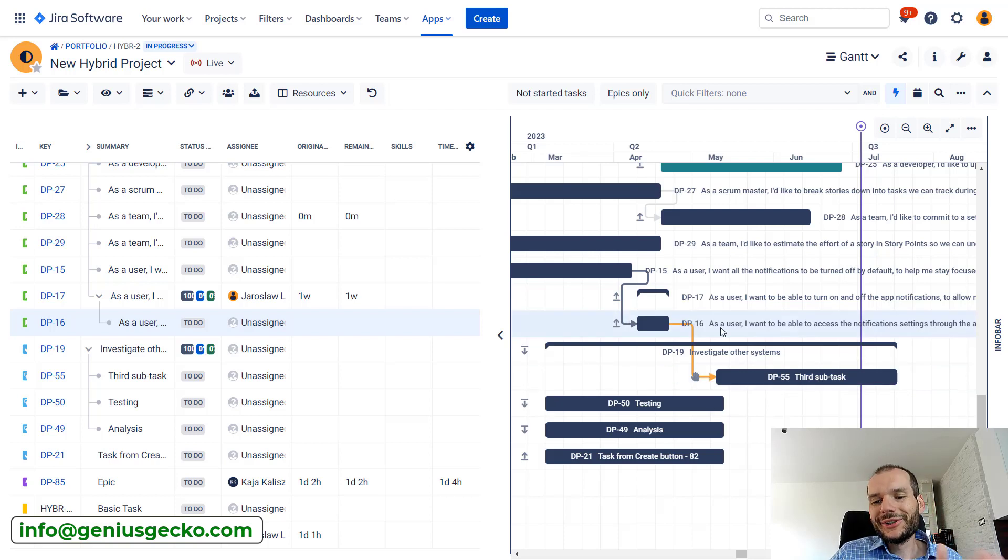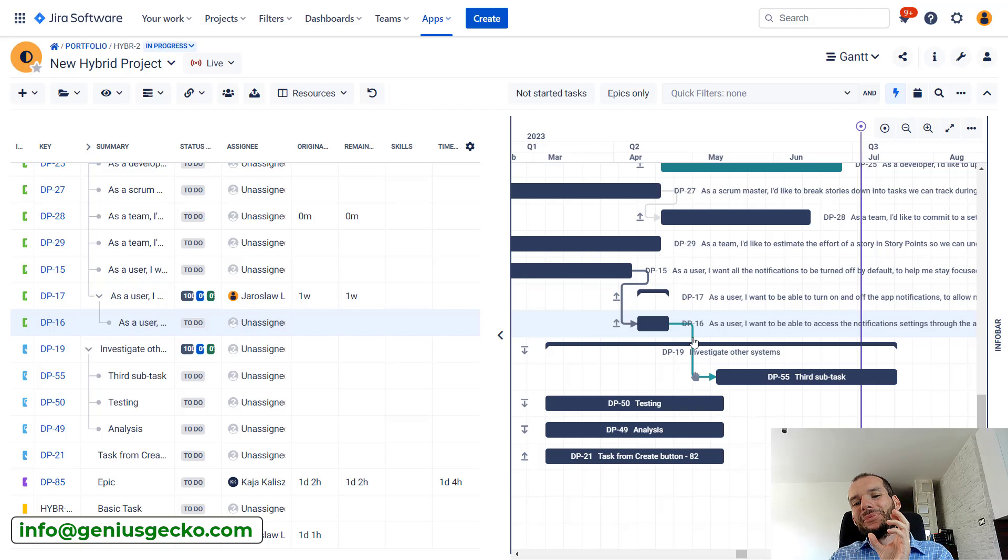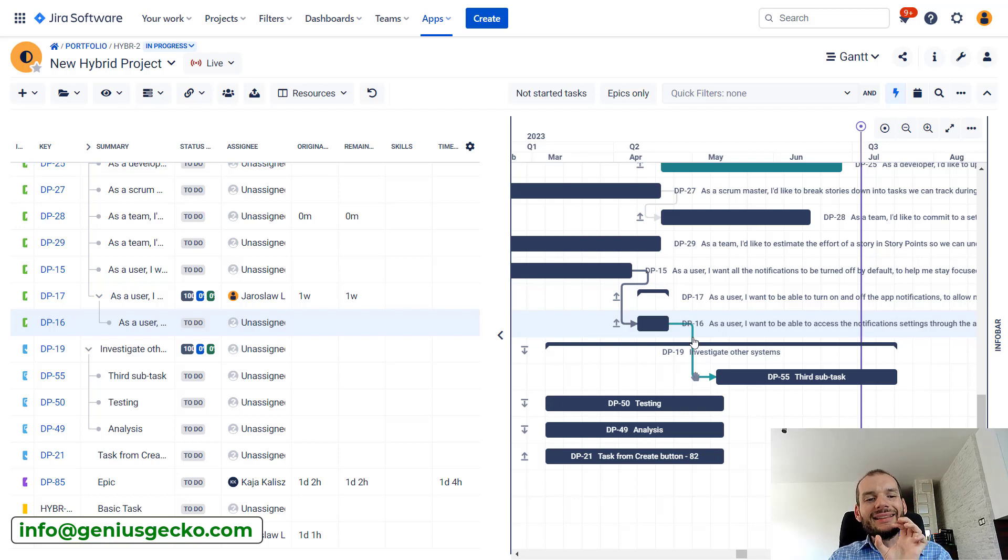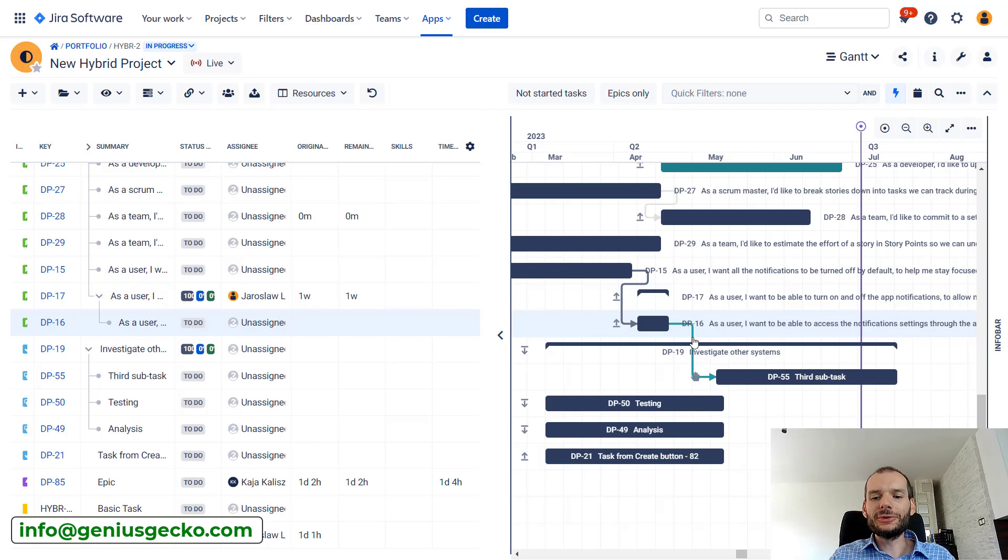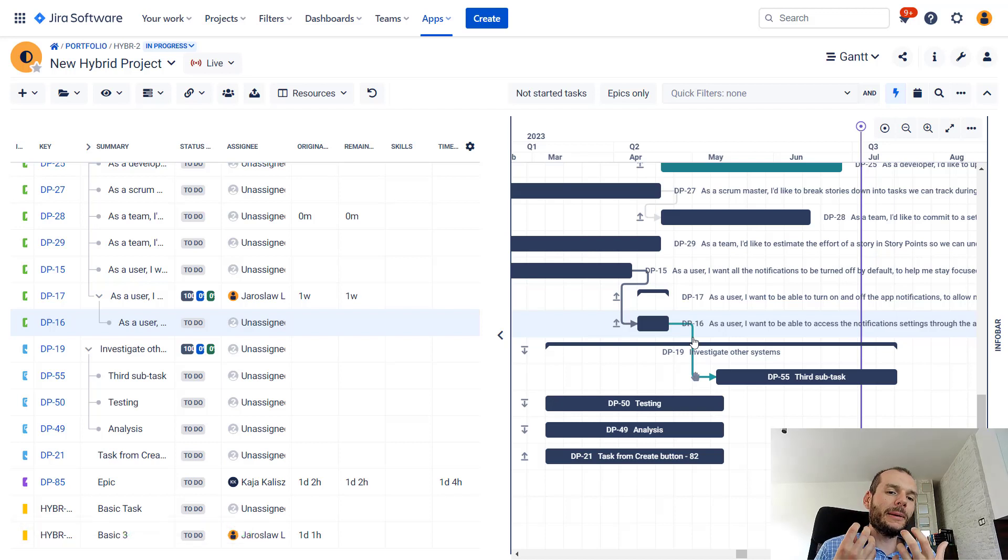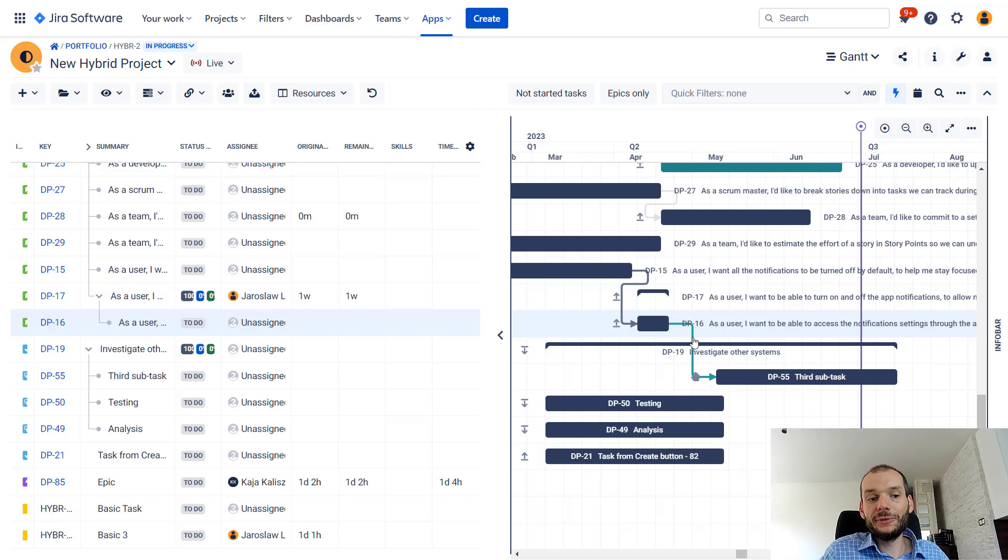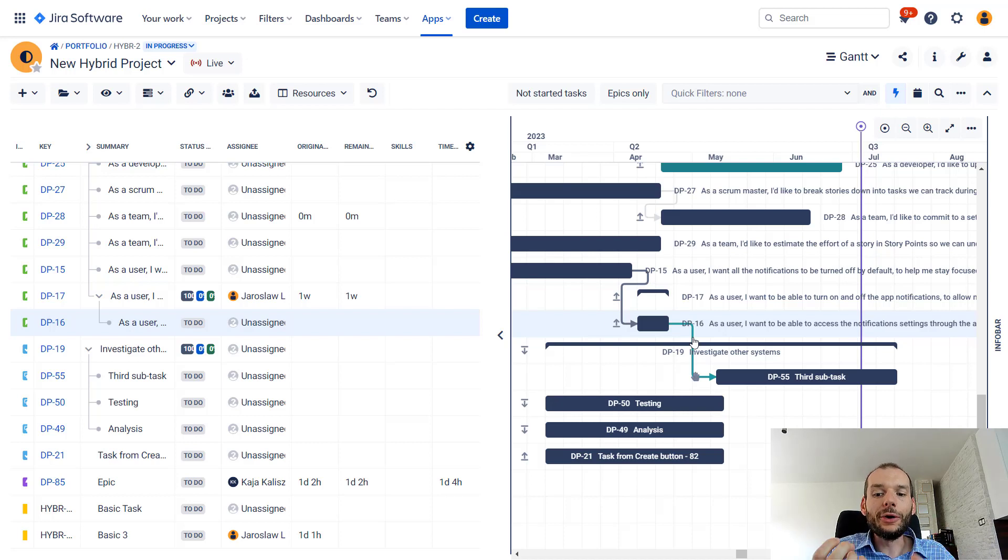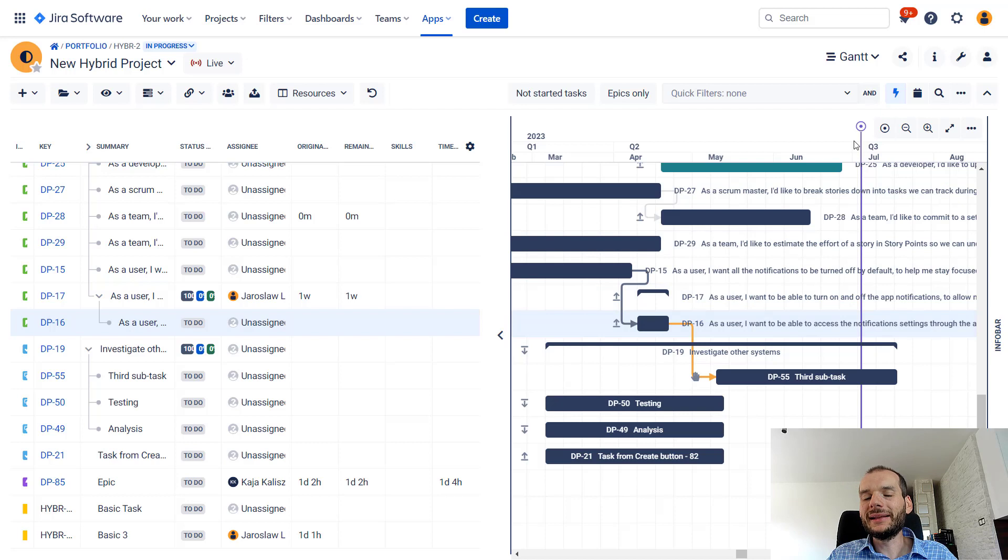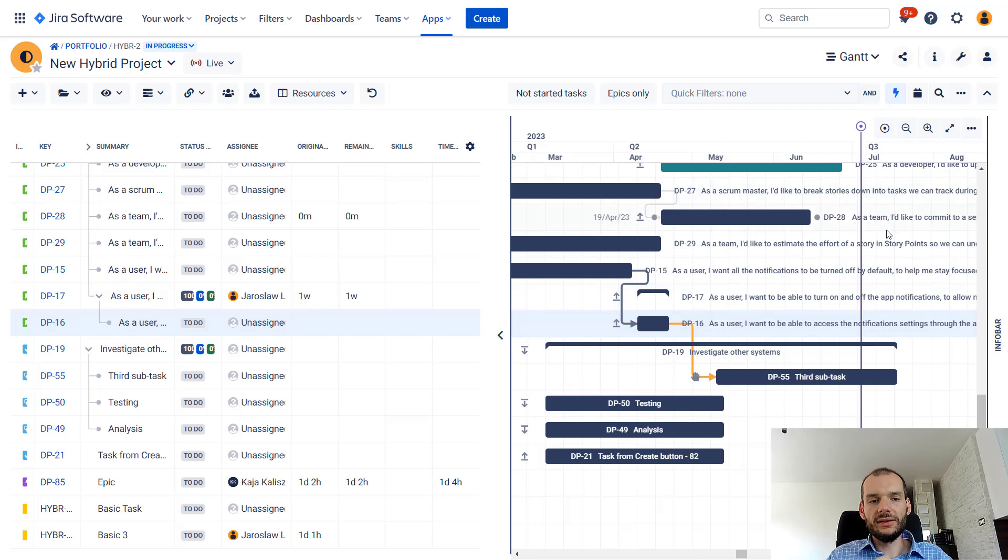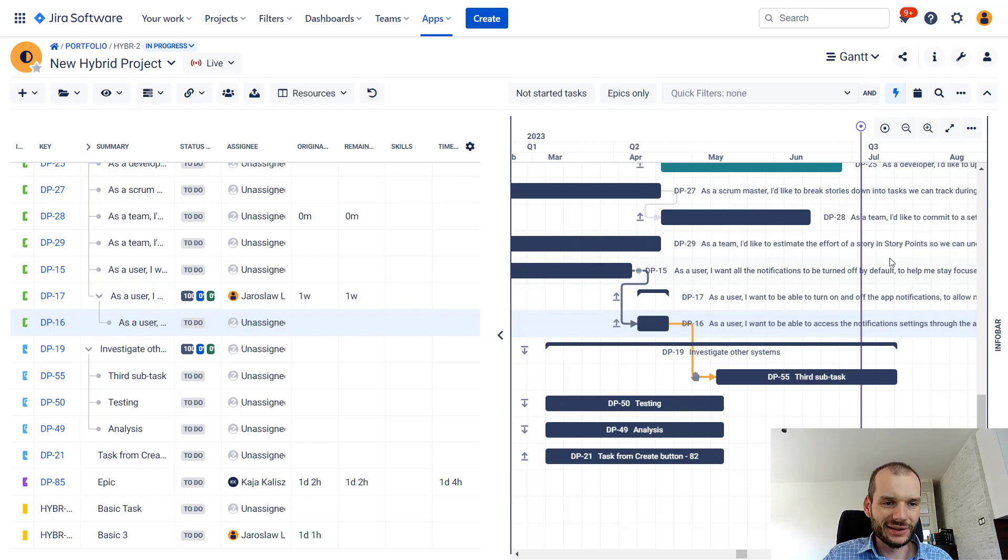Probably our plan could be optimized in the meaning that this task could be started earlier, and all the tasks potentially dependent on this also could be moved on the timeline. Maybe the whole project thanks to that could finish earlier. Again, you see yellow dependency - you need to investigate why this is happening and if you can do something about this. There will be cases where Big Picture won't update your plans automatically, won't give you the solution automatically, but in that case it highlights the dependency and allows us to see that we need to pay attention to this one.